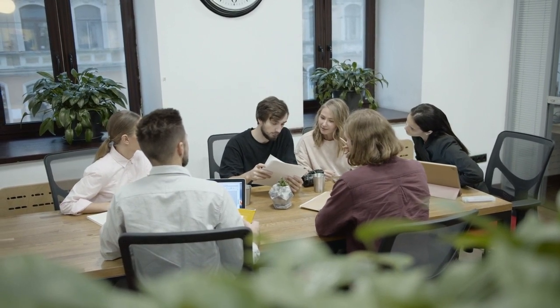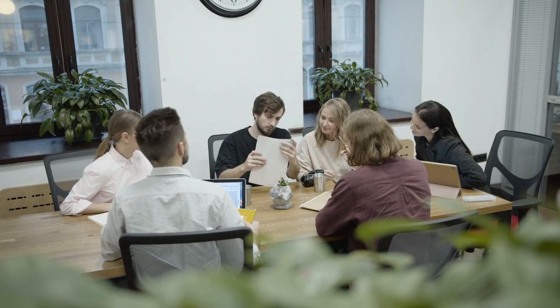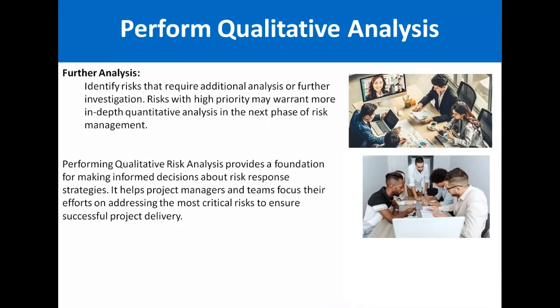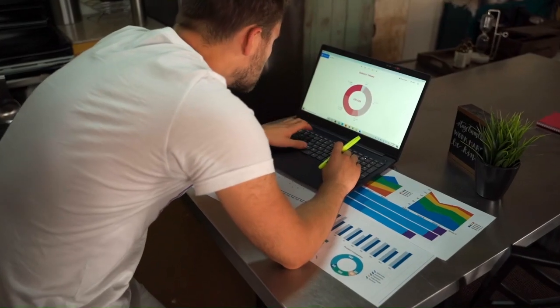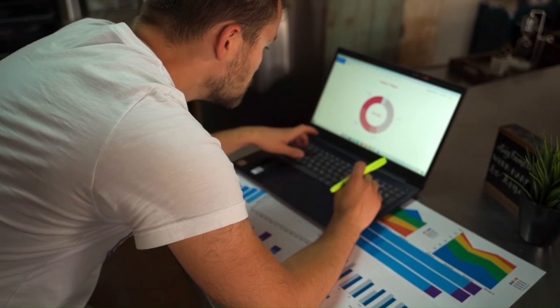Communication means communicating the results of the qualitative risk analysis to relevant stakeholders. Ensure there is a shared understanding of the prioritized risks and their potential impact on the project. The analysis results — covering high, medium, and low impact risks — should be communicated appropriately to all stakeholders, including vendors and customers. Risks that require further investigation and high-priority risks may warrant more in-depth quantitative analysis in the next phase of risk management.